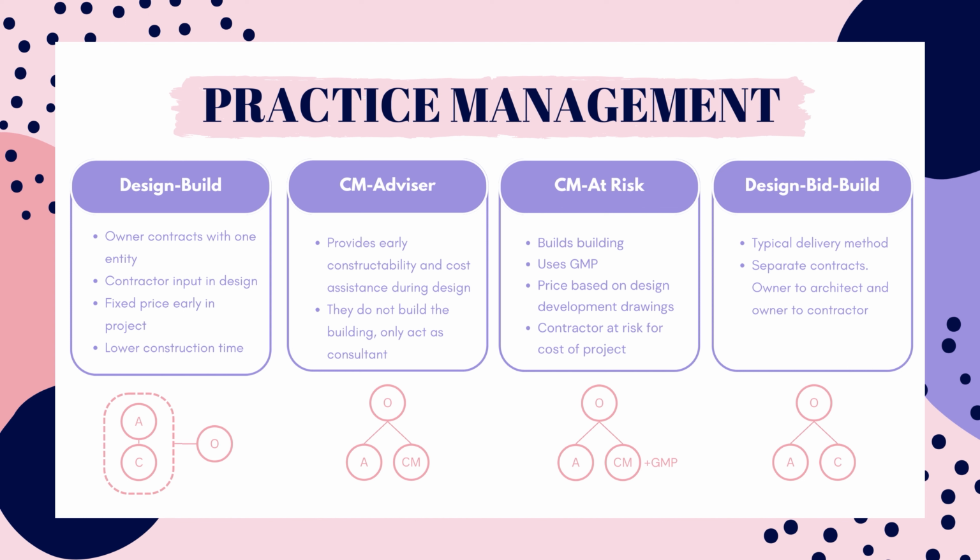Design build promotes teamwork, streamlines communication, and can potentially lead to more efficient project delivery due to the seamless integration of design and construction expertise under one contract. Construction manager as advisor has a minimum of 3 contracts: owner to architect, owner to contractor, and owner to construction advisor. This method involves the owner hiring a construction manager early in the process to provide pre-construction services, but they do not build the building.